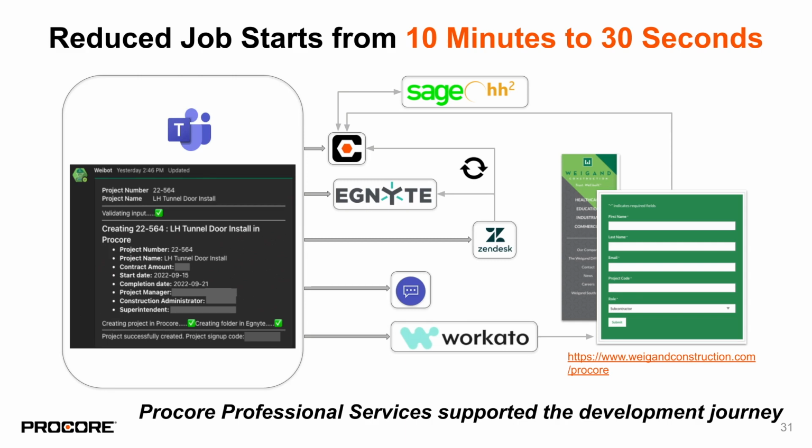So what we ended up doing is we start with a manual process. On the left here in Microsoft Teams, we're using a Workato workbot, that's their term for it, as a chatbot, and you say Workato help, I want to create a new job, and then it asks you for that list of information there. I think it's 6 key things it's got to know to start a job. Start date, end date, contract amount, name, and then we got some extra stuff that's optional, but we want to have it. So you type those things into a form in Teams, and on the next screen you'll see it spits back some feedback on what's going on.